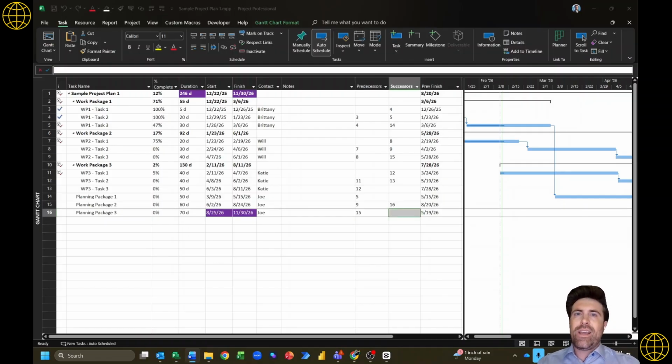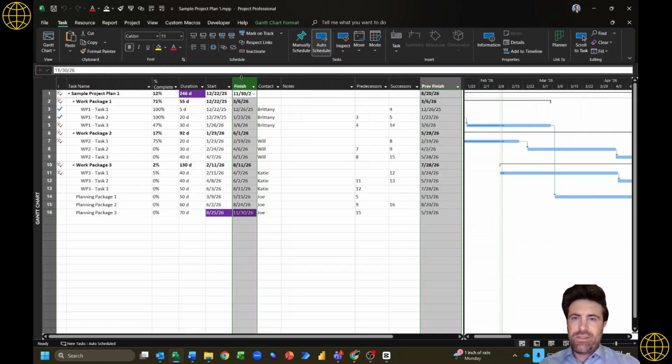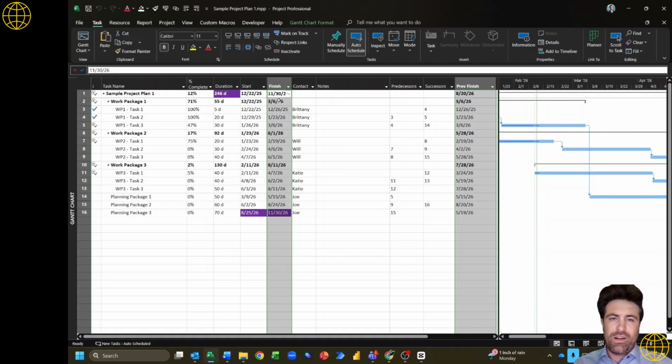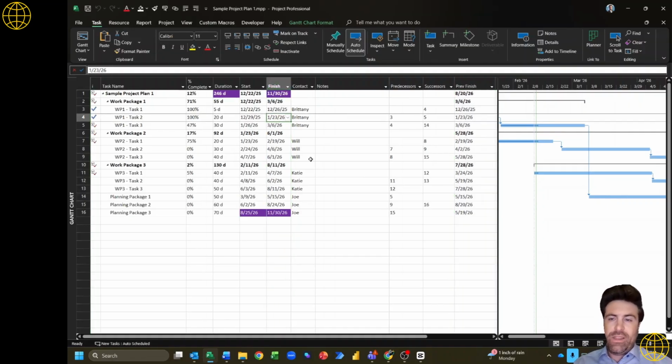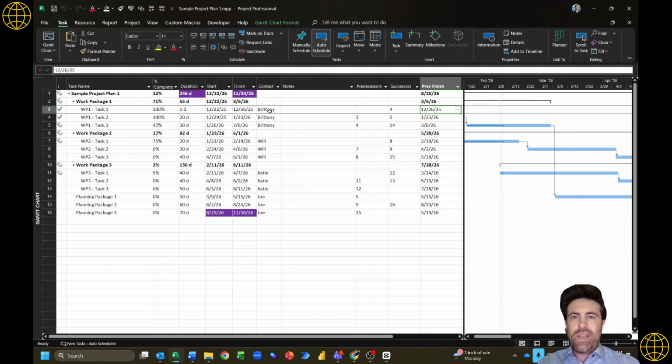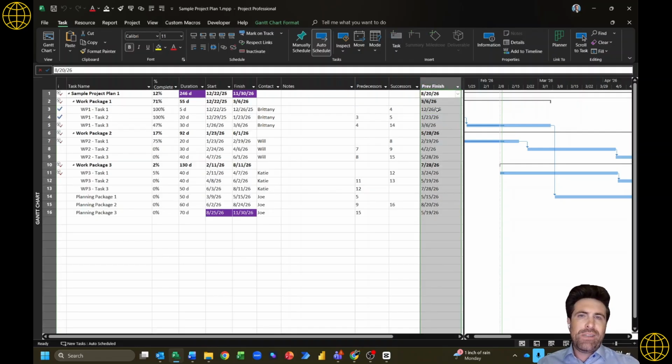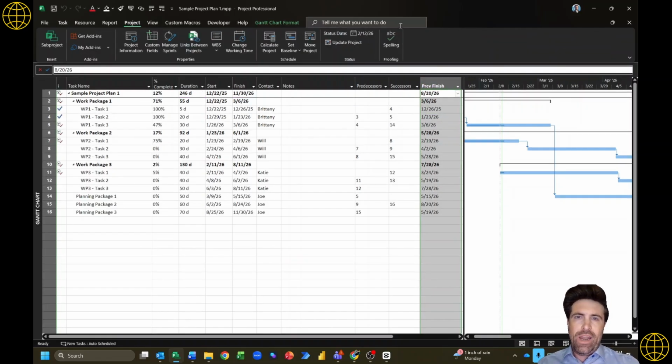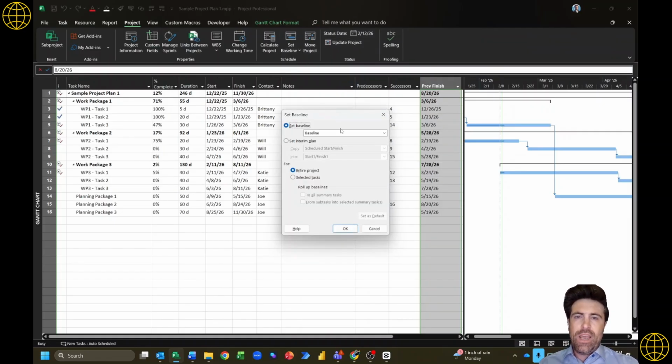So the last thing I wanted to show in this video is, all right, now we're able to analyze what has changed from our original schedule to our current schedule. Maybe now we're at the point where, all right, this is the schedule that we're comfortable with. Let's set a formal baseline, right? Let's baseline this entire plan. Everyone here agrees we have the right logic, the right dependencies, the right constraints, and the right durations for everything. Instead of just having the baseline 1 set, we want to go ahead and set a baseline for the entire project, the formal baseline. In which case, we wouldn't be using baseline 1, we'd be using baseline.